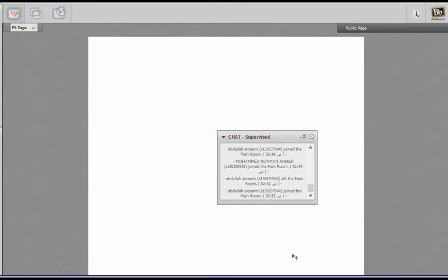You will also be given the weights and the total scores for those factors by various projects, which you will first reduce to percentages, and then add all the percentages to know which of the project options has the highest score. This is the fourth applied question that can come from chapter 4.